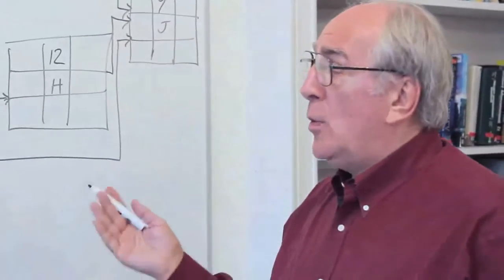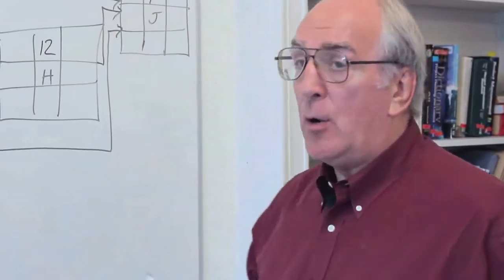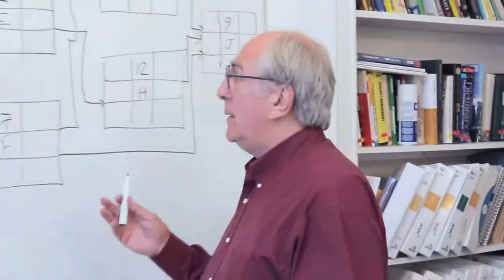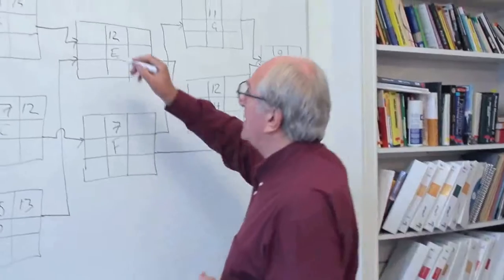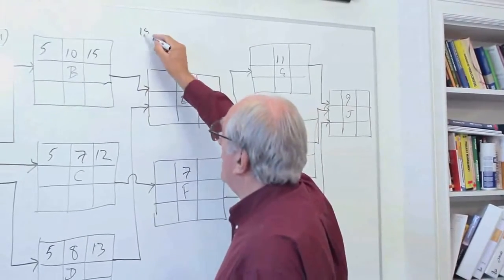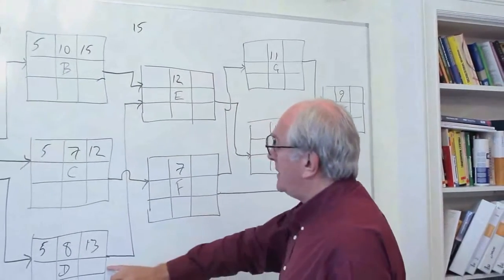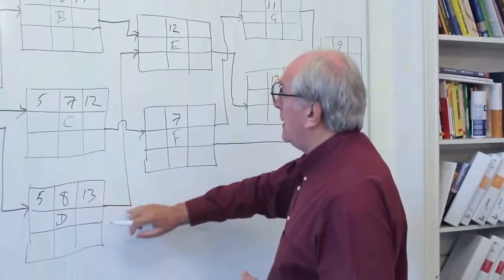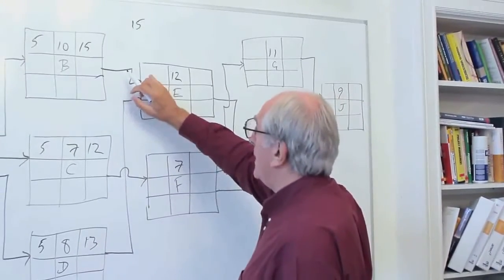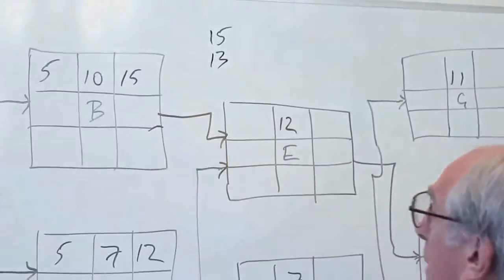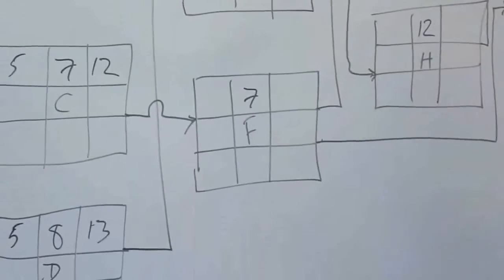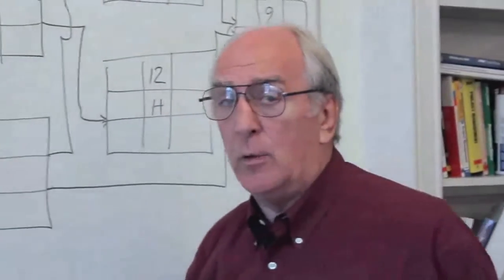So we're tracking through on what's known as the forward pass, trying to find out how quickly we can do this job. And in order to look on as where we're going, we say, well, what's the earliest time we can do activity E? Well, there's 2 choices there, because it looks like we could start it by the same reasoning as before, time period 15, or from D, where the early finish moves up to become the early start of E, it could be 13. So it could be the early finish of B or the early finish of D. Very simply, we have to choose between those.